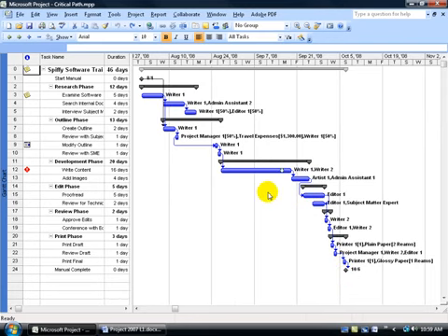We could say, well, every task needs to finish on time. Not necessarily. For example, up here, I've got a couple of tasks that, if I don't finish this task on time and it gets delayed a couple of days, well, obviously you'll push this task out because of the finish to start relationship. This task must finish before this task can start. But if it gets pushed out a couple of days, notice it's got nothing else linked to it, so it's not pushing out any other task. It still finishes before the project end date, so it's not critical. So even if it's just a day, it doesn't make these linked series of tasks a critical path.